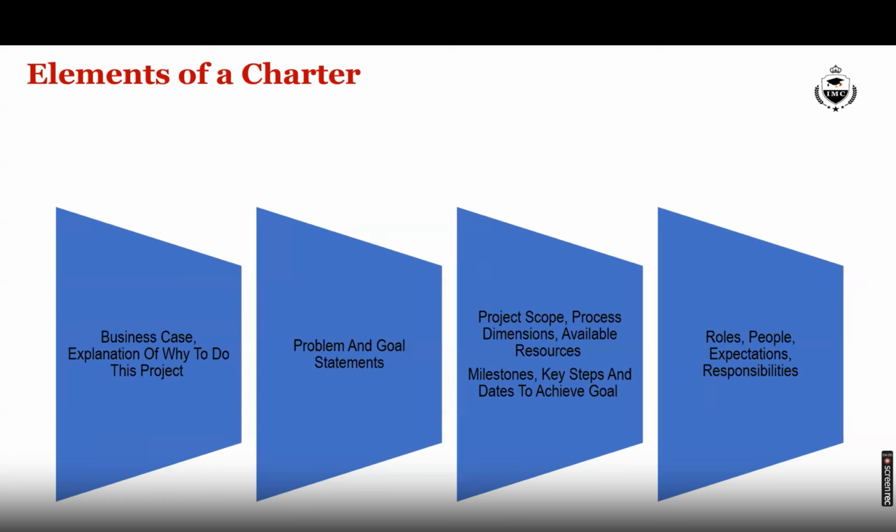First column, give the heading phases. Second column, planned start date. And the third column, planned end date. In 5 rows, you write define, measure, analyze, improve, and control. Against each phase, you put the planned start date and the planned end date. So that would indicate when you plan to start the project and when you plan to end it.